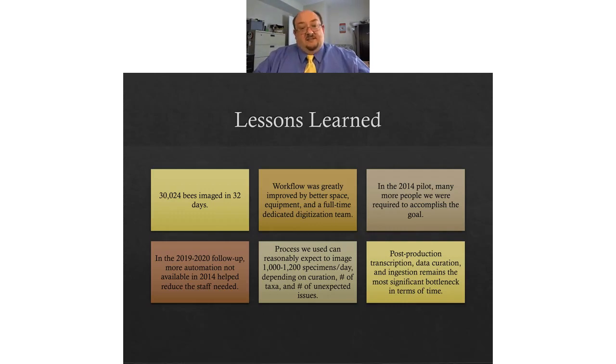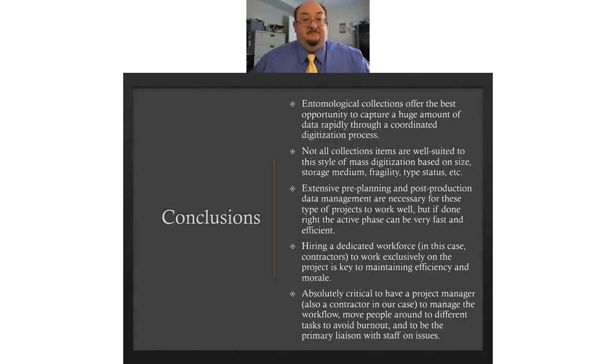In both studies, though, the post-production transcription data curation and ingestion into EMU remains the most significant bottleneck in terms of time. Now, part of that is we didn't include enough time or staff to do that kind of work on the back end. If we had it to do again, we probably would include additional human resources to help Jessica do this part. But again, lesson learned.